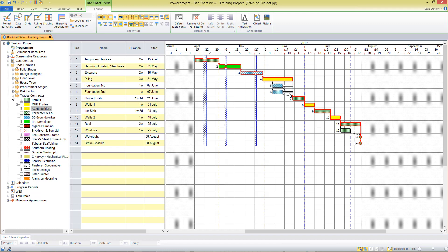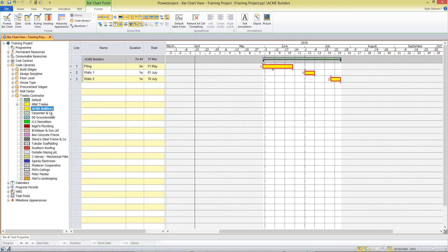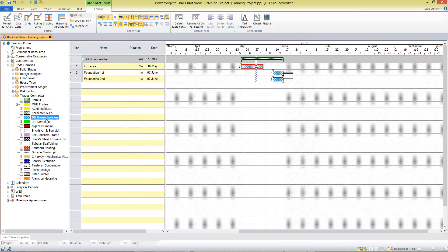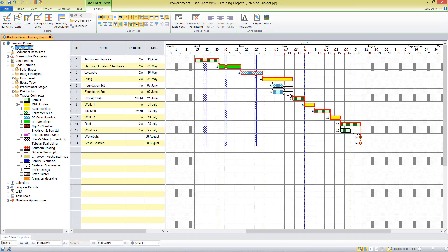For example, I might want to produce a list of only those tasks that ACME Builders are doing for me. I can do that by right clicking on the name in the project view and opening a code breakdown structure. That gives me a restricted view of only the tasks that hold that code. As I click on my other contractors, the project changes to show me only those items. I can move back up to the program level to show the whole project.